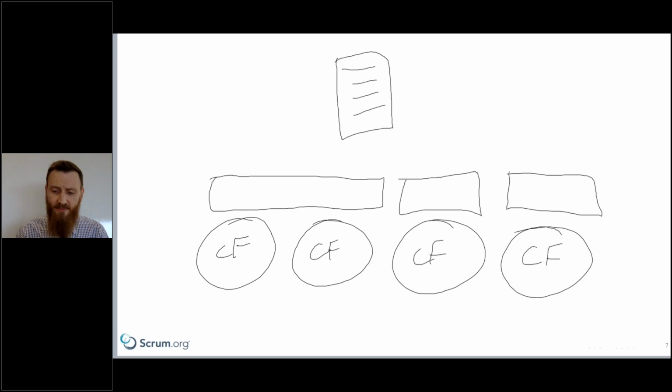So we have a few things going on. The teams on the left side of your screen here that share that code base, they're going to have to stay synchronized. And ideally, they just stay synchronized all the time, every day, every sprint. And if you drift away from staying synchronized, then you're going to have a lot of integration work to do down the road, and that's just kicking risk down the road. On the teams that don't share that code base, you still have to stay synchronized if the assumption is that this is one product, right? So all of this rolls up to this one product backlog that we're defining the vision and roadmap for where we want to go for this product.